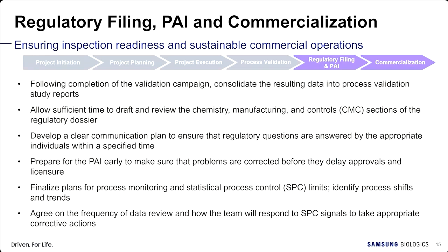CMC sections of the regulatory dossier are generated and submitted to the agencies. The regulatory agency can ask for additional data or questions during the review of the dossier. Both the sending unit and receiving unit are responsible for responding to those requests. Regulatory questions typically need to be answered within a specific time, so a clear communication plan between the technology transfer team is